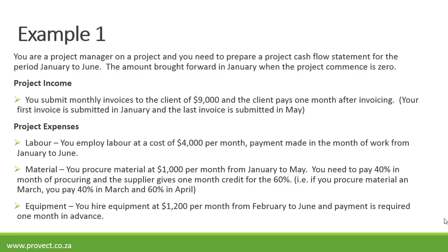For example one, you are a project manager on a project and you need to prepare a project cash flow statement for the period January to June. The amount brought forward in January when the project commences is zero. With regard to your project income, you submit monthly invoices to the client of $9,000 per month and the client pays one month after invoicing. Your first invoice is submitted in January and the last invoice is submitted in May. On your expense side, we have labor, material, and equipment.